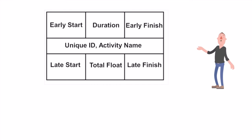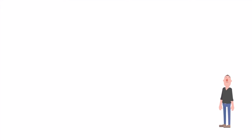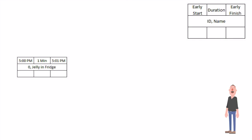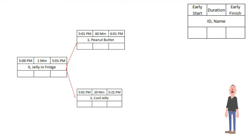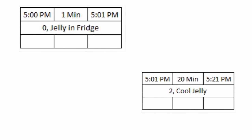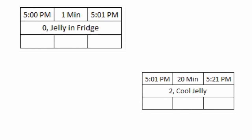Let's map out our sandwich project using this method to understand what these labels mean. With our first scenario, we were putting the jelly in the refrigerator ourselves, so that will be our first activity. The early start for this activity was 5 p.m., which simply means that this activity can't start any earlier than 5 p.m. The duration is one minute, and then the early finish is simply the early start plus the duration, so 5:01 p.m. is our early finish. This activity precedes two other activities: leaving to get our peanut butter and letting the jelly cool in the refrigerator. The earliest we can start allowing the jelly to cool is 5:01 p.m., so our early start for letting the jelly cool equals the early finish of the last activity. The duration for letting the jelly cool is 20 minutes, so the early finish is 5:01 plus 20 minutes, which equals 5:21.